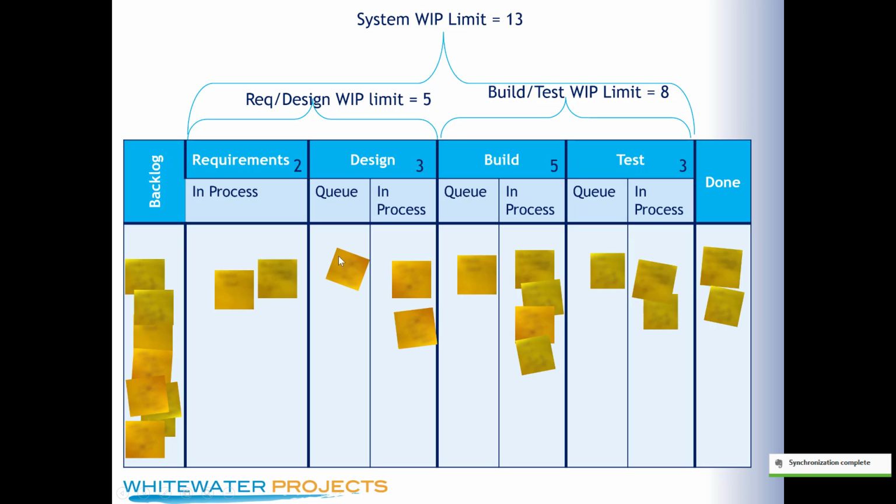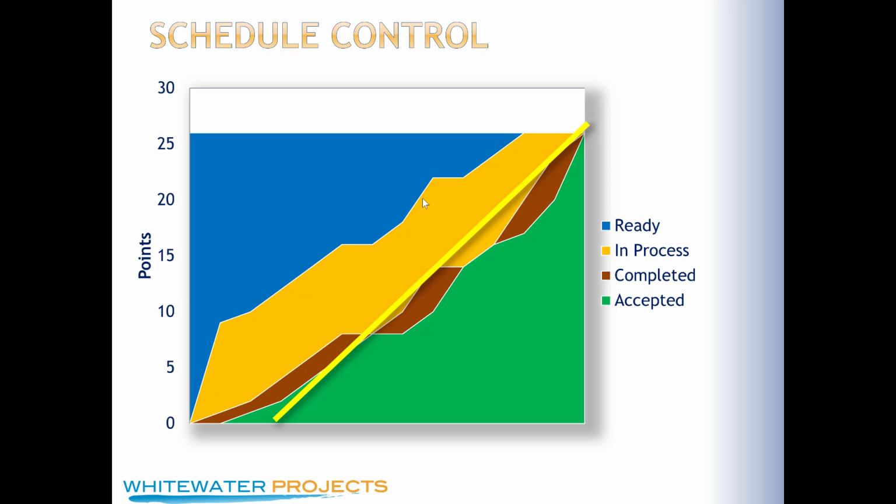Then you'd be able to see, okay, how much work is getting through, and are our WIP limits appropriate? As soon as things are flowing really smoothly, then you might want to tweak with these, right, to push yourselves. Ask yourself as a team, not, don't push a team. If you're a leader, don't push a team to do this. But you may ask them, hey, have you thought about increasing your WIP limits to flow more work through? It looks like you've got a lot of slack time across here. So let's see if we can flow it. But yeah, so that's how you would control schedule.